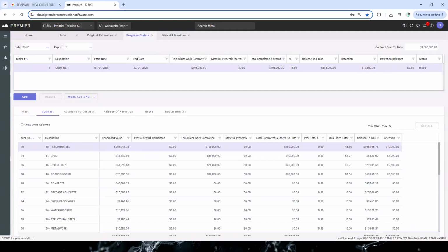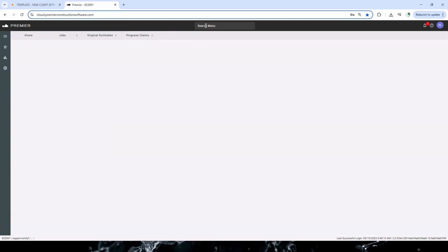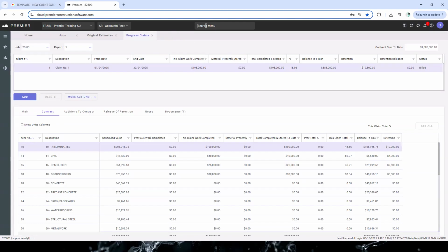All good. Okay. Now, I'm going to give you an example. Let's say you have done your progress claim, you've raised your invoice, sent it to the client, and the client, for some reason, has come back and said, oh, no, sorry, you can't claim $100,000 worth of preliminaries, you can only claim $50,000. Now, rule number one, never ever edit the invoice that is on the posted AP invoice screen. If I just shut that, that invoice would be on the posted AP invoice screen.